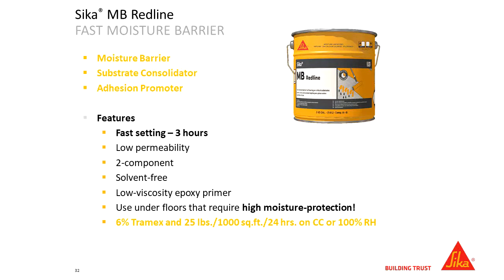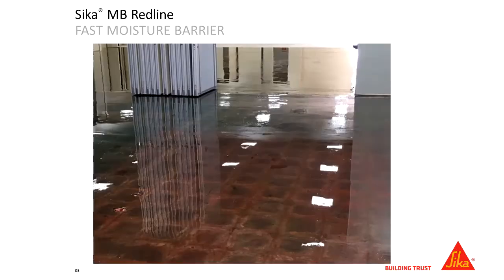if they're doing a refit of a Walmart where they're replacing the flooring, typically they'll go in, they'll rip out two or three aisles of floor covering, and then they want it done and ready to go as quickly as possible because they can't have the aisle shut down. So this product is specified a lot on those type of applications. Grocery stores as well. I'm involved with a grocery store out in the Midwest that is using this product, because the same thing, they can't be shut down. They can't have aisles shut down for an extended period of time, so they need to get on top of it as quickly as possible.